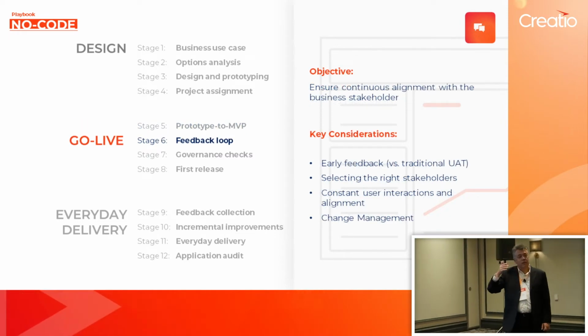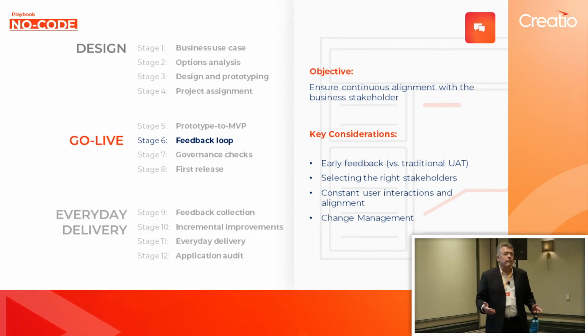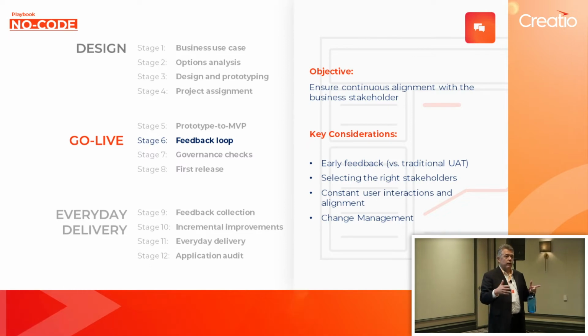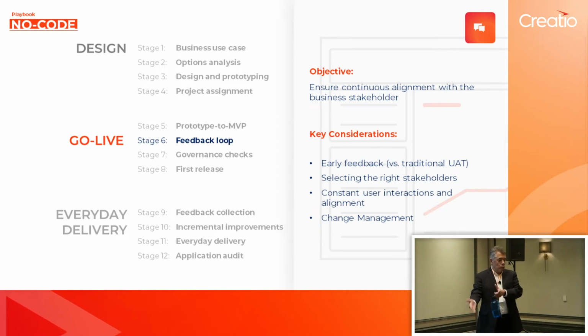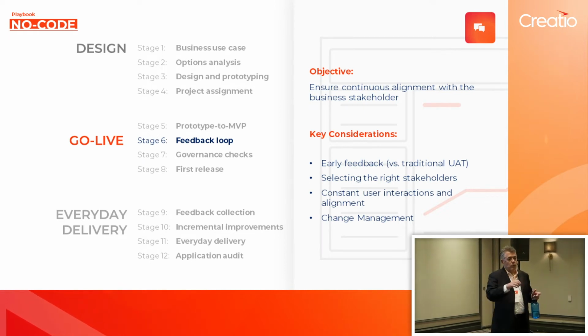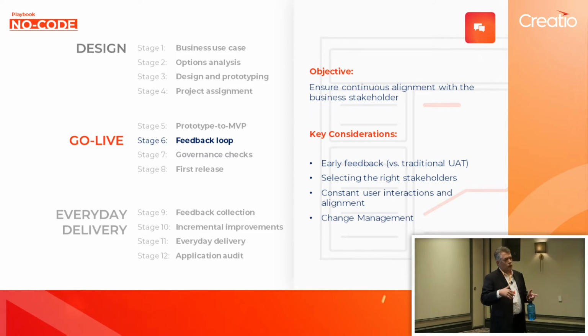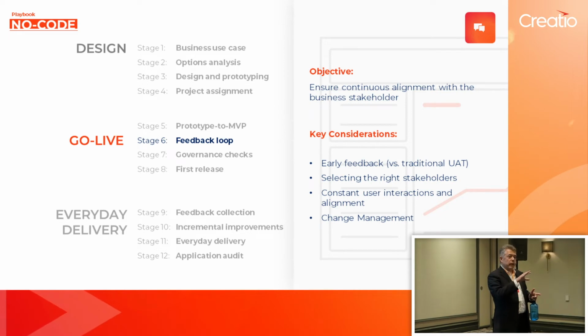Yeah, so there you go. Kanban was the first point on the list. For those who aren't familiar with it, it was popularized by Toyota and Japanese manufacturing, and it is prescriptive only about how you track work through a board, right? Everyone's probably seen a Kanban board of something that's in development or waiting for development. It's really good at helping to organize work, but it doesn't get prescriptive around timelines or roles, like you don't have to have a Scrum Master. So the nice thing about Kanban is that you can usually layer it into your existing team or existing structures more easily.